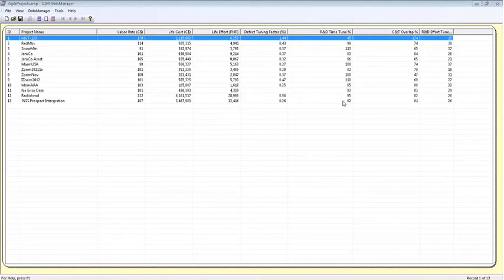The phase 2 tends to be almost as long as phase 3, with a significant overlap with phase 3, at least in the projects that we had access to here. And so I can show you how it is useful to get this information into your trends so that it can be used when you're estimating projects.